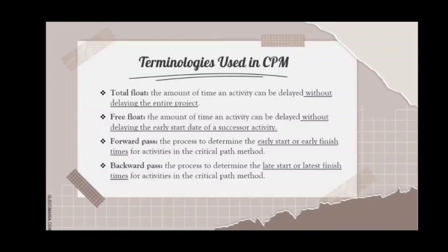So, bottom line, total float doesn't affect the entire project, which still sticks to the target date for its completion, even though there might be some delays while accomplishing a certain activity of the project and might cause the succeeding activity to start late. Meanwhile, free float clearly states that the completion of activity 3 of the project, for example, has been delayed, but it shouldn't cause the following activities to start late.